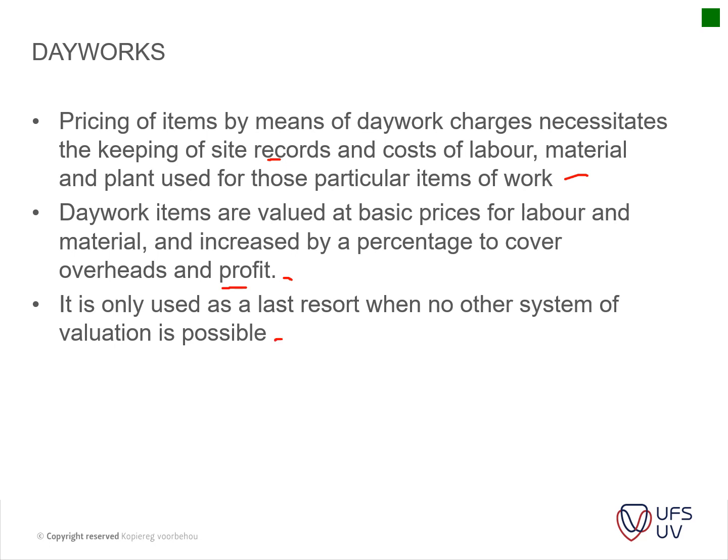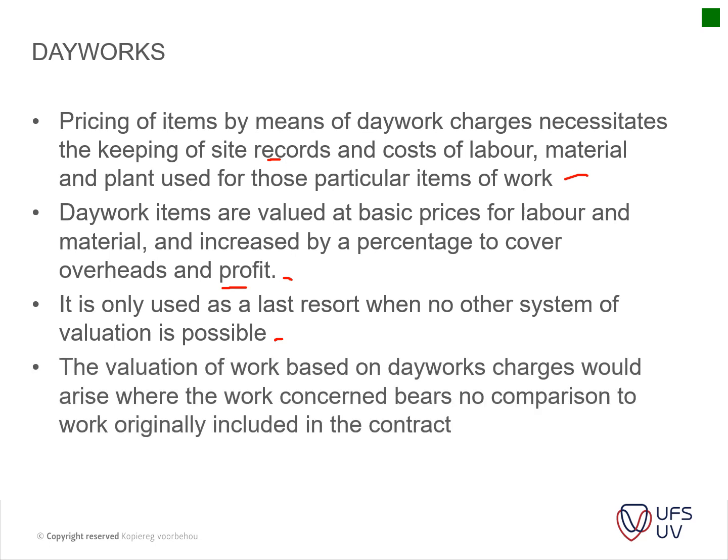Okay, so you can see it's just a lot of admin, and it's usually difficult to keep track of. If you've got a good site presence, like the civil engineers usually have, or on engineering projects, it's much easier to implement because you've got someone from your side also looking at the implementation of that item. Evaluation of work based on the day works charges would arise where the work concerned bears no comparison to the work originally included in the contract.